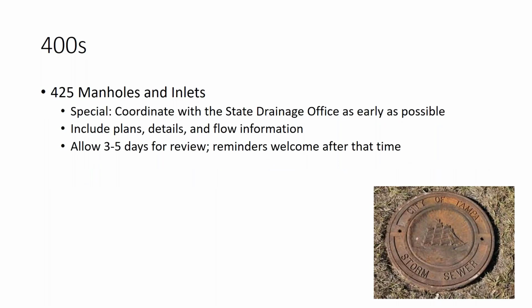Moving on to section 425 for manholes and inlets. If you have a special need, that will need to be coordinated with the state drainage office, and we ask that you please do that as early as possible, because sometimes the best solution is not a special type of manhole or inlet, but they may want to look at alternative designs or ensure that you have already looked at those alternative possibilities,